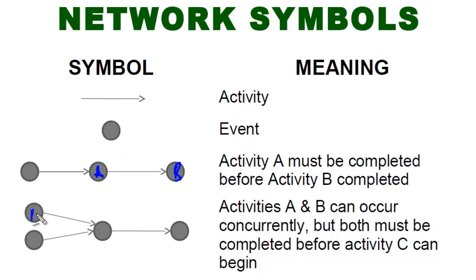Now say for example this is A and B and C, where A and B are simultaneously coming up. Say for example we are installing the printer and training the operator. They can come simultaneously, not a problem. But when you now want to print, both of these things should have happened so that you can start C.